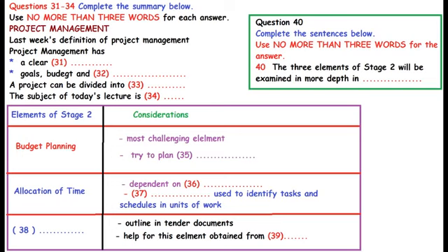The third part of your planning, as I said, will affect your money and time considerations, and that is the standard of delivery that the project demands. These standards will be outlined in the tender documents, if they've been your guide or the master plan from which you're working. Always make sure that for every unit of work that is to be completed, you'll have to write specifications.